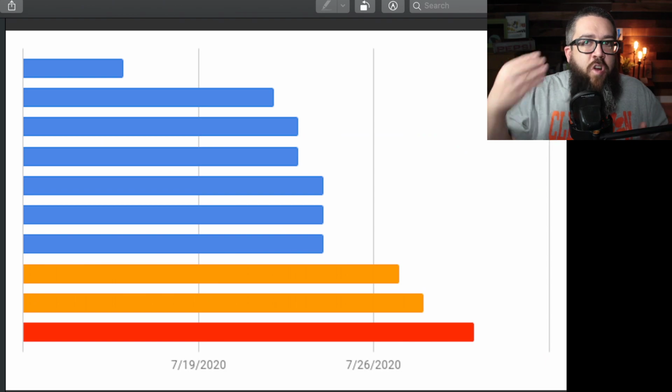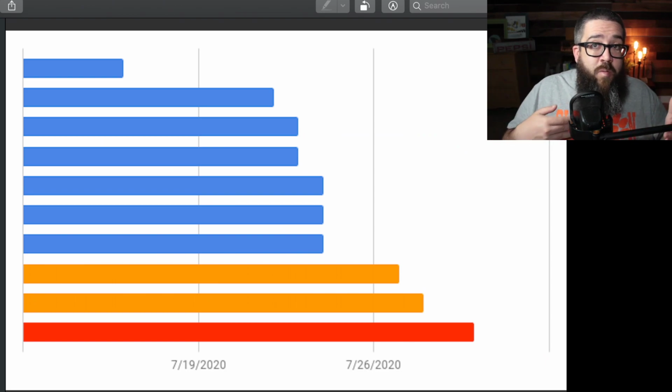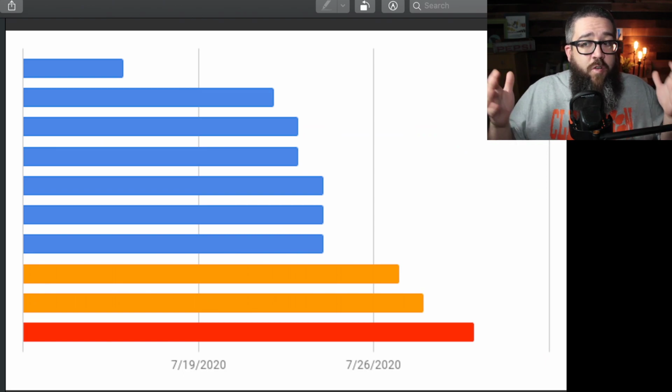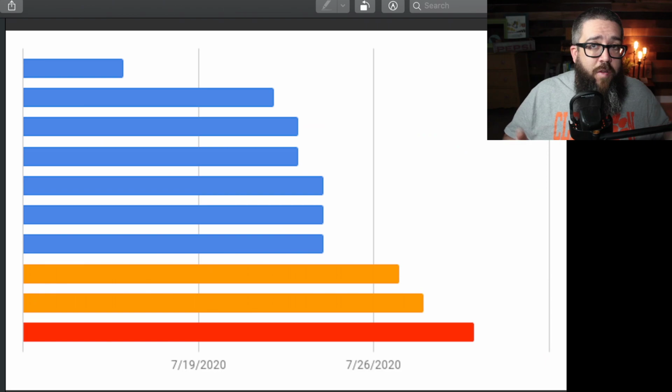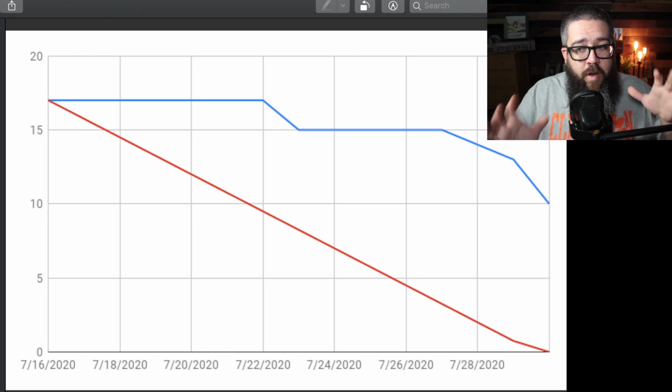Because what the aging chart is showing us is the reason we're not burning down comes back to, again, something we talk about on my channel all the time. If you've got too much work in progress, your cycle time is going to be long. If your cycle time is long, then you're not burning down. Okay, so let's go back to the burn down chart again.